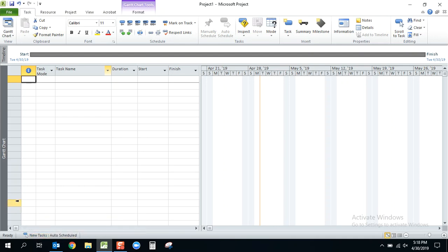And what that means is that each task now, instead of being manually updated where you could change the duration and move it around accordingly, it's set up in an auto schedule format such that once you insert the logic and create the relationships, the schedule will shift accordingly when you start adjusting durations and making modifications, which is really the intended purpose of the software.